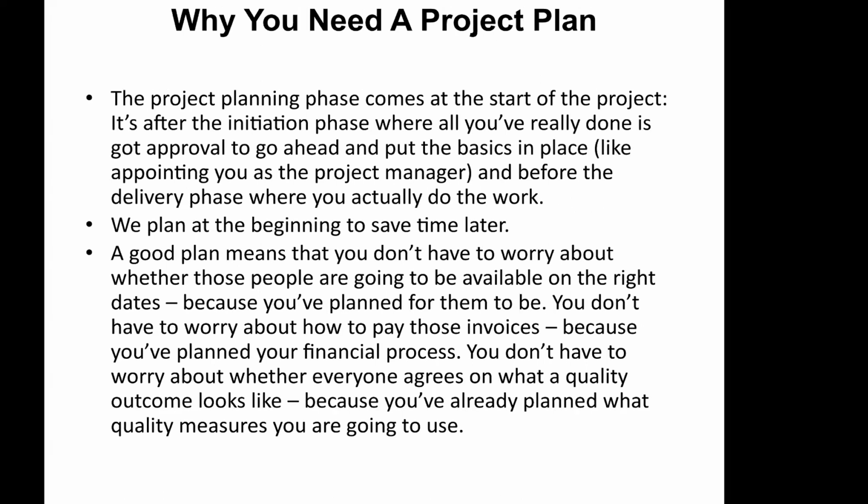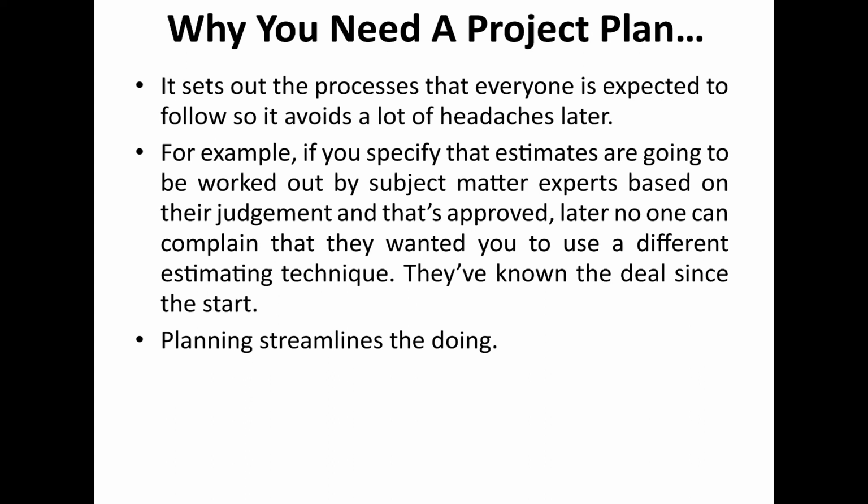So why do you need a project plan? It sets out the processes that everyone is expected to follow. So it avoids a lot of headaches later, because it's just about following. For example, if you specify that estimates are going to be worked out by subject matter experts based on their judgment, and that's approved, later no one can complain that they wanted you to use a different estimate technique, because they have known the deal since the start, right? So planning streamlines the doing.